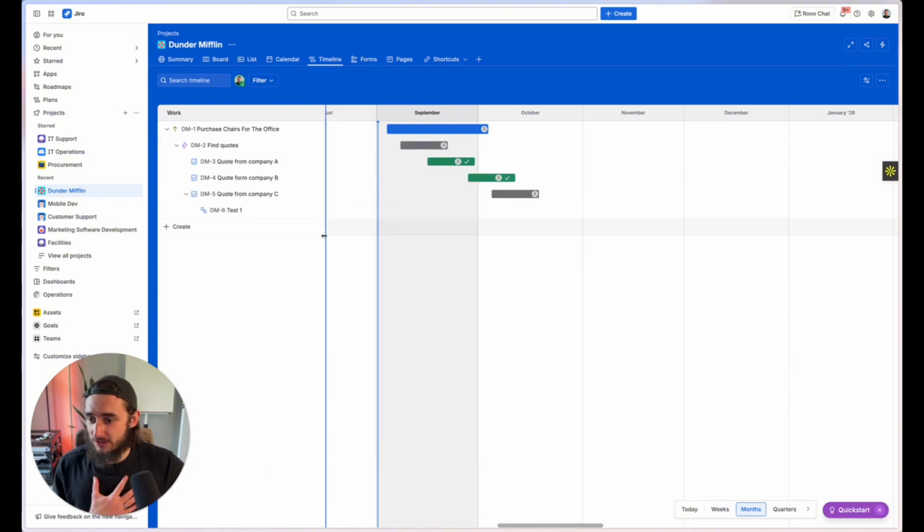And oftentimes I like to think about these as subtasks or standard subtasks. Tasks are just the one-off things that you have to do. Epics are sort of the bundle of a few tasks. So something a little bit bigger that may take a few weeks. Above that, you have initiative, which is something that takes a couple of months or sometimes multiple weeks that have multiple epics rolling up into them. I think of these sometimes as like bigger projects or bigger things that I need to complete. And then above that, you could have programs or like your campaigns that can last multiple months or longer. That's kind of how I like to think about it and visualize it.